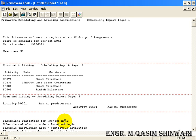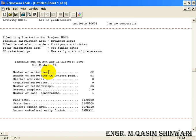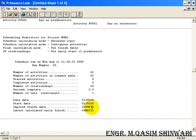There was some problem in the last project so I made some changes; one change is the project name, which I changed to Home One just to differentiate. The total number of activities is 62. The data date is 1st July 2008, which is also the project start date. We want to finish the project by 28th February 2010, but the calculated finish date is 4th May 2011. We need to start some activities simultaneously to attain the 28th February 2010 finish.